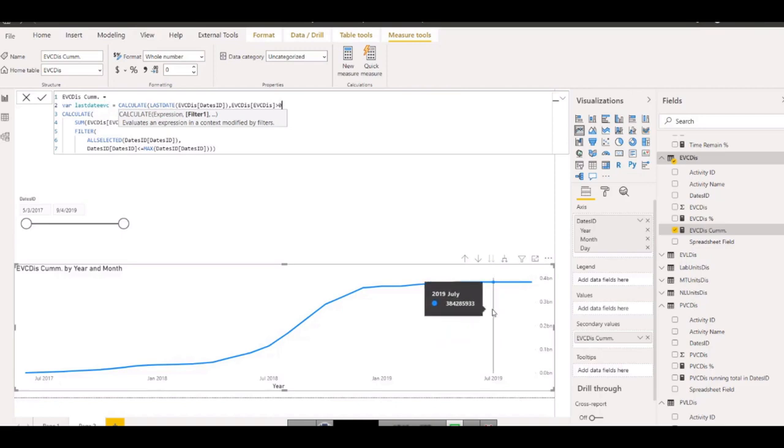So that's why we want that if the current month value is 0 or less than 0, in fact there shouldn't be any less than 0. If the current month value, whichever value, earned value cost distribution, plant value cost distribution, earned value labor, actual labor, any value which is related to time period, if the value of that particular date or month is not greater than 0, then it shouldn't give the answer to me.